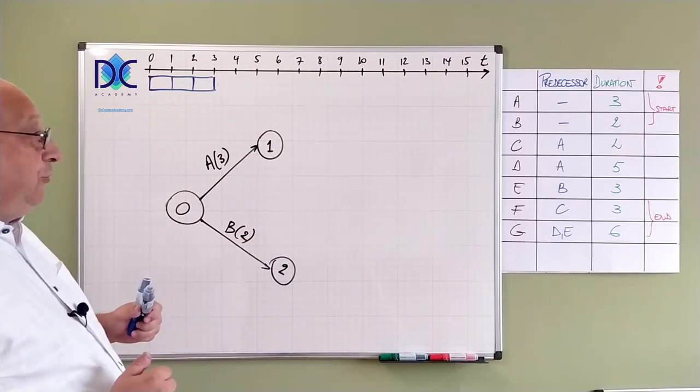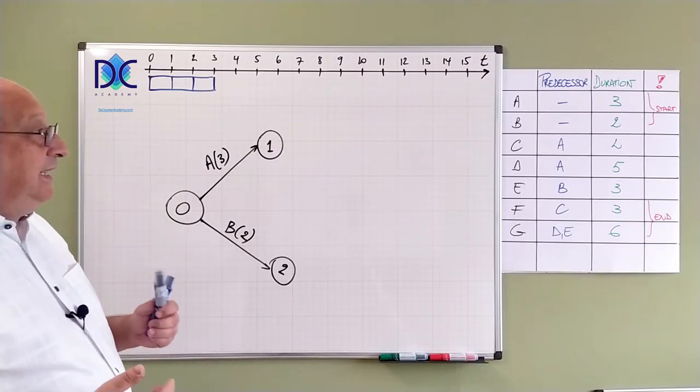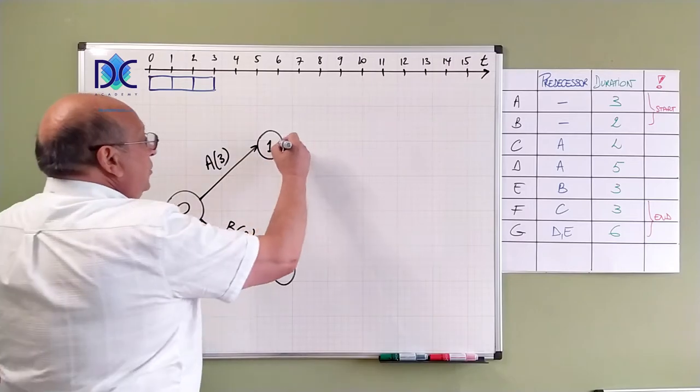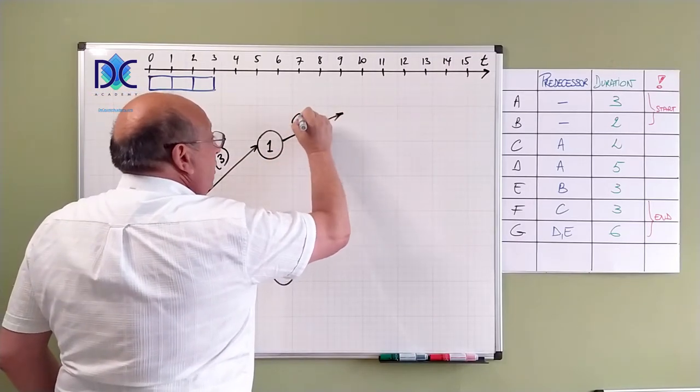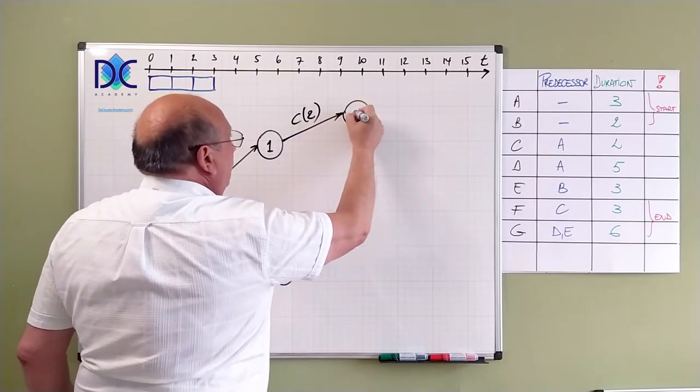Now we have to continue. We go to activity C. C is after A. So I draw C here with a duration of two and I call this node three.